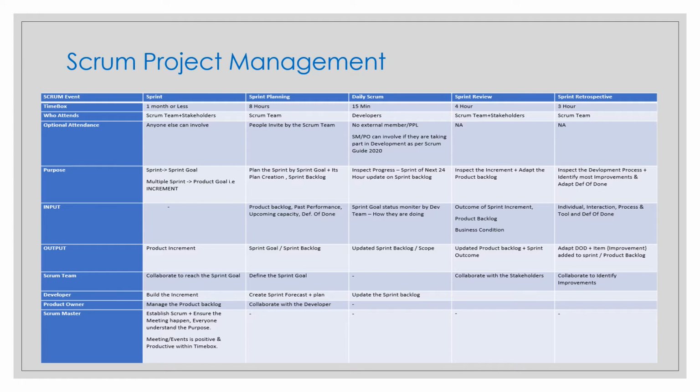So as a user, I want to create a home page of a website so that my home page will contain whatever outcome you require. Okay, so as a, I want, so that. The Scrum team decides which format works best.